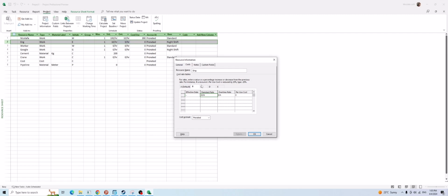Let's say I have a consultant, and this person is an expert, and if I want to use him for a different type of work, he is going to charge me a different price. So the basic concept here is one resource can have a different price based on the different type of activity.